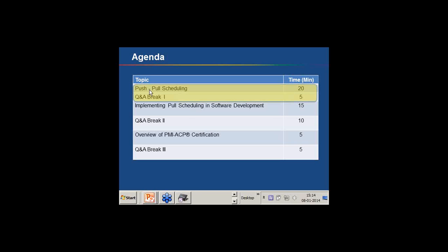Now, we will see how this should be implemented in the software development industry or in any project development industry. But Lean strongly opposes a fractional assignment. It says that rather than assigning one person on multiple things, we should keep work in progress to the minimum, and we should keep finishing things faster. So if your scheduling style is like this, where you are allocating one person on multiple projects at the same time, and the project nature is quite different, it is kind of against the Lean principle, because we talk about why we don't recommend a fractional assignment.